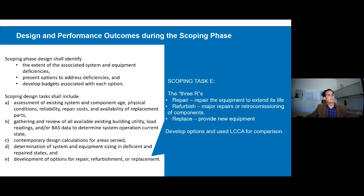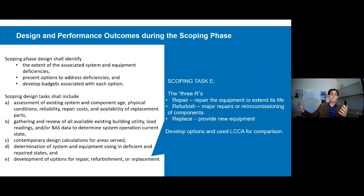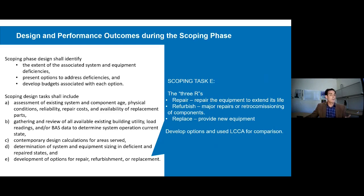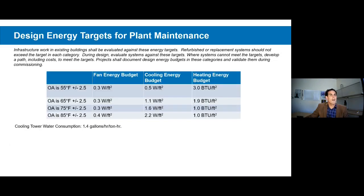The final task of scoping is options development, and we like to talk about these as the three R's: repair, refurbish, and replace. For any system or system component, those are the three things we want to look at — can it be repaired, how long would a repair extend the life, is there major refurbishment or retro-commissioning that can happen, or does it need to be replaced? This is the step where we would do life cycle cost analysis if there are significantly different options with significantly different first costs or downstream costs.